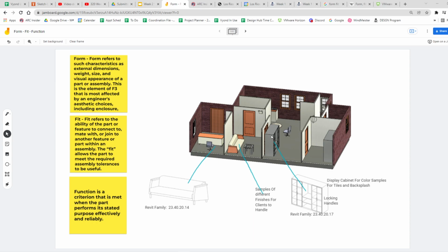There's 2 inches of clearance. There's no problem. You can get it in. We've laid it out. And they go, yeah, you forgot that it has to be on 3-inch diameter rollers to get in. It hits by 1 inch. Oh. So even when you know the form, sometimes the fit in architecture can be problematic.